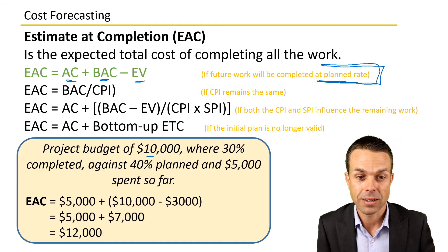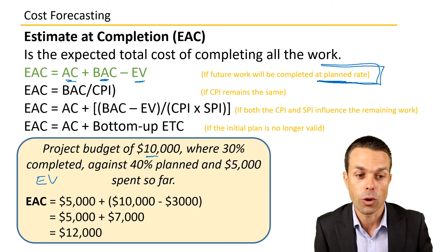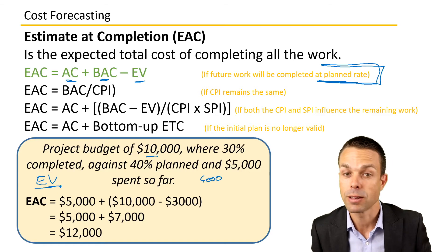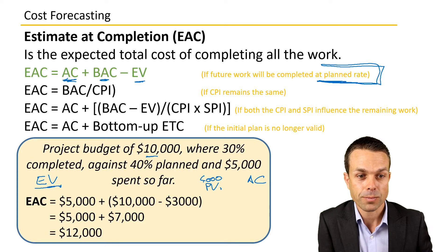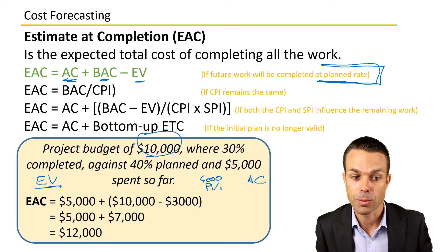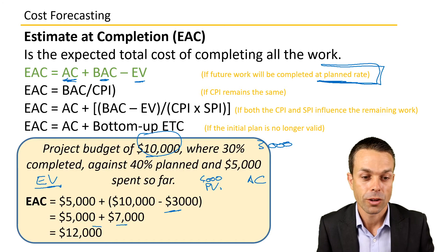So remember: budget at completion is $10,000; 30% completed is our earned value — $3,000; 40% is our planned value — $4,000; and $5,000 is our actual cost. Plugging in: AC ($5,000) plus BAC minus EV ($10,000 − $3,000 = $7,000). So $5,000 plus $7,000 equals $12,000.